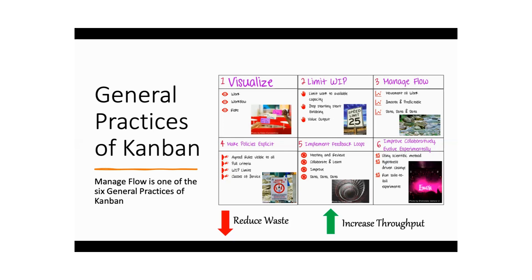When you prioritize those improvement areas, you prioritize them collaboratively within your team. These are the six general practices of Kanban in a bird's eye view. When you implement all six general practices, they help you increase throughput and reduce waste, and once you reduce waste, you optimize your flow.